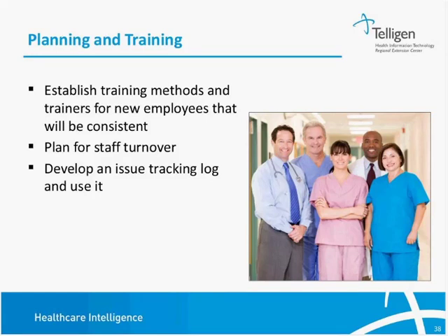Another important piece is to develop that issue tracking log and use it. So again, when people come into that suggestion box and leave messages on the helpline or call you up or email, tracking those logs, tracking the follow-up, making sure it's all taken care of. You can even put it in a WIP document if you want to create an easy way to update those issues.